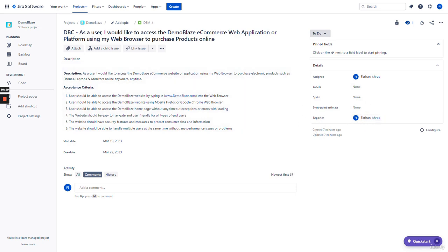As we move along the lifecycle from to-do to development, in progress, testing, approval, and done, what you will see happen is that every single team member from the development team or the testing team will assign it to themselves at that point of the life cycle. Let's say, for example, this story moves on to the next phase, which is development. The developer on my team will then assign this story to themselves once they have a development user.